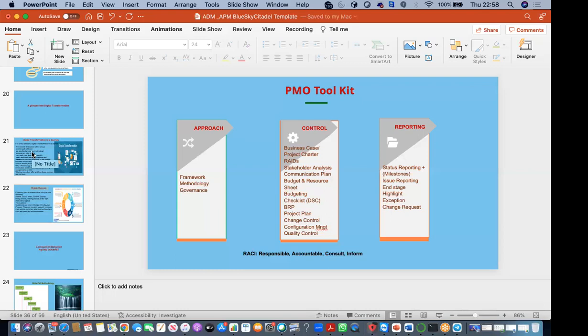When we talk of burn down chart, it is looking at, for example, you have committed yourself to deliver 20 things in 10 days. And on the 5th day, you have only delivered 3 out of 20 things. Are you doing well? No. Burn down chart shows this for us graphically. Helps us to know, guys, the way you are delivering.